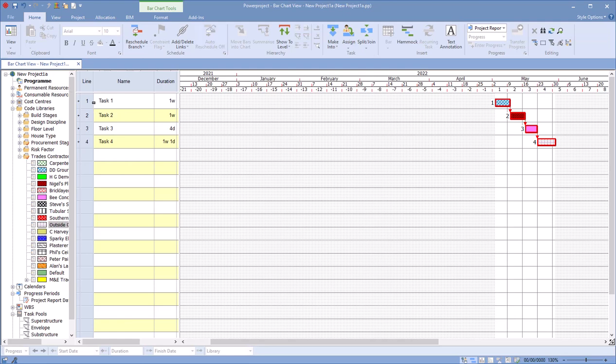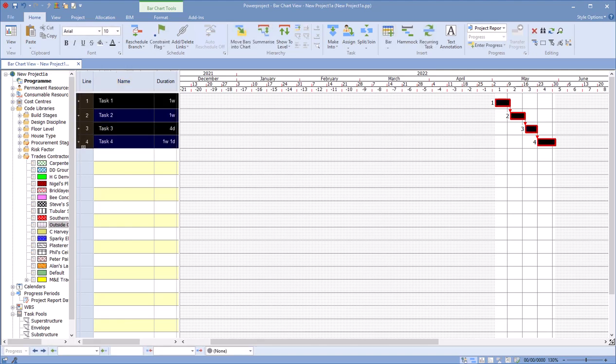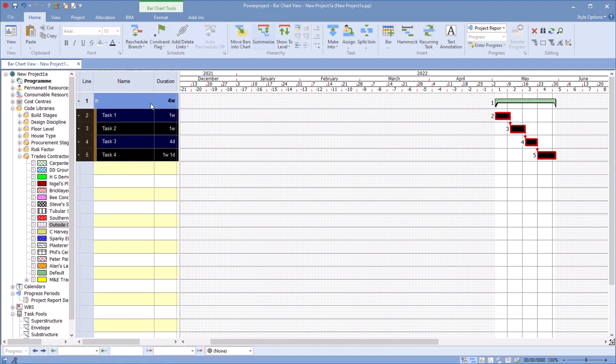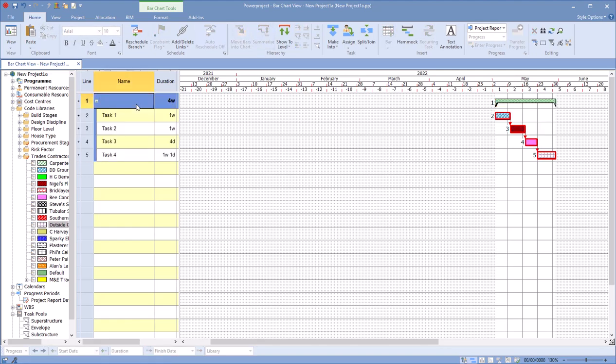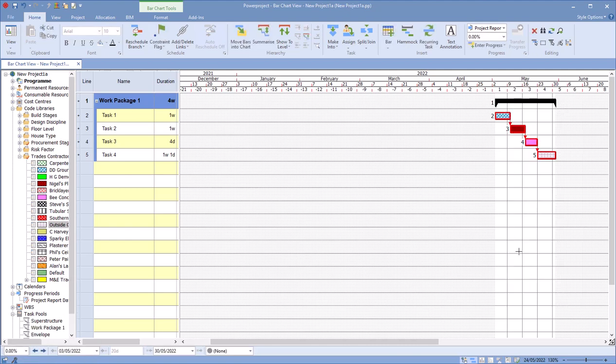Now what I do need is I need to have a summary structure or expanded. So this is my, let's call it my Work Package 1. And once I've got that in place, what I can do now here is I can go over here, right-click on this task. There's an option here to Copy Task, Copy to Task Pool, and when I do that...